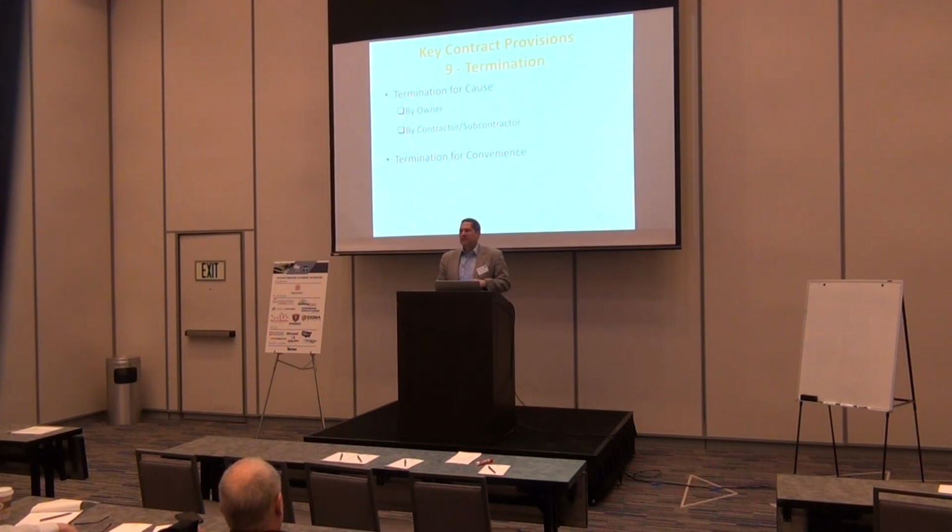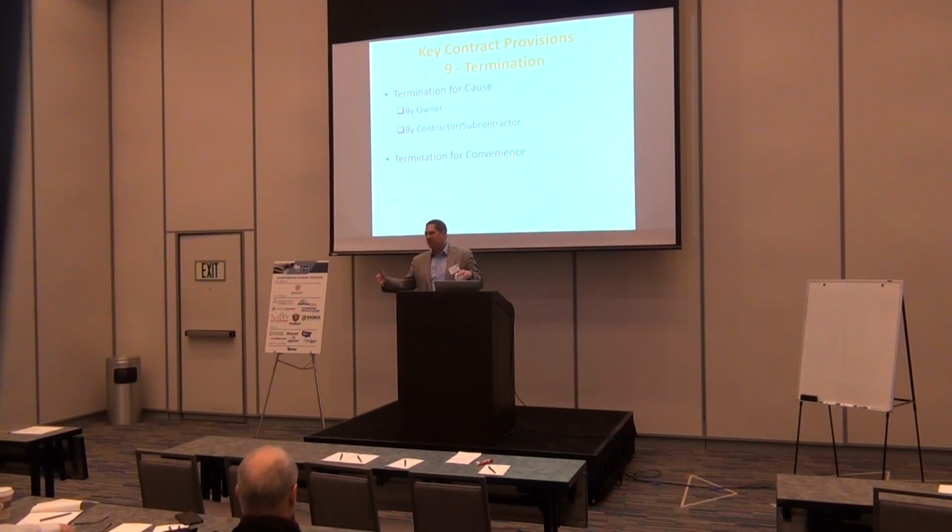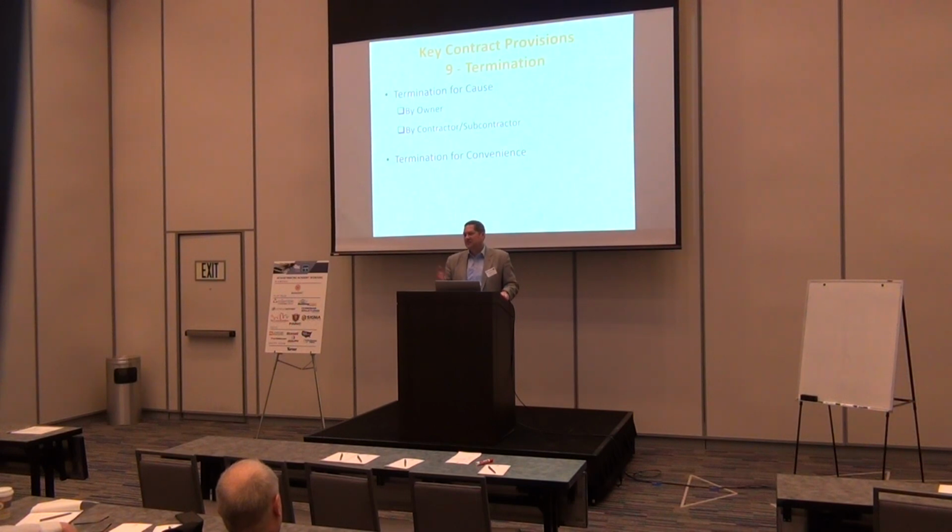Now, most standard contracts have a clause that says I can terminate you for my convenience, which I think originally meant, if the project shuts down or something like that, it's a way to terminate the contracts downstream. But the way they're used is, you can be out there and work 50% on a project and they can say, terminate for convenience, and hire somebody else. A lot of contracts say that they can just do that. I don't think it's fair, but it is what it is.